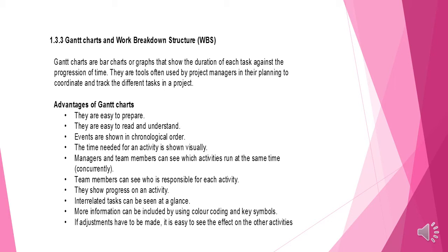The project must be carried out from the 10th of August until the 30th of November. Brickwork starts from the 20th of August until the 15th of September. From there, plastering must start from the 30th of August until the 10th of October, which means brickwork can start from the 20th of August until the 30th of August, and then before the brickwork is completely done, plastering can begin.